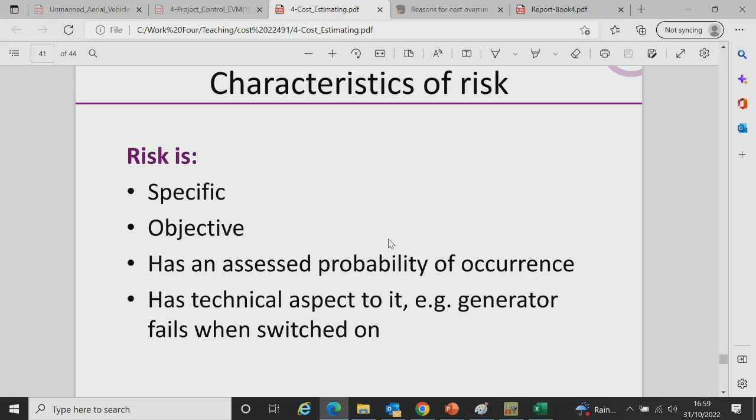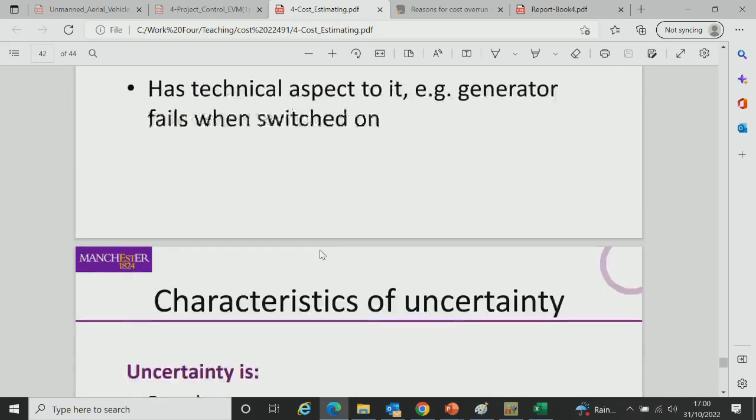you know, real obvious events like that. There could be a crash, blocking the road. Doesn't happen every day. Whereas all the other things you're unsure about contributes to your uncertainty, your lack of knowledge, and your random statistical knowledge contributes to there being a range of times it takes you to get to university every day. It's just a source of uncertainty, it's variation because of random effects and lack of knowledge. Whereas a risk, you can pin it down to a specific event. Like so.